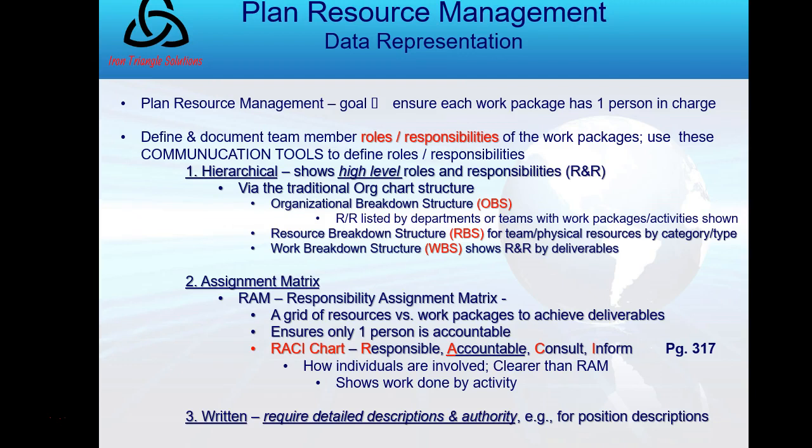The assignment matrix gets a lot more attention, and it's known as a RAM, Responsibility Assignment Matrix. It's a grid of work with the work packages and the deliverables. A subset of that is called the RACI chart, and that stands for Responsible, Accountable, Consult, and Inform.